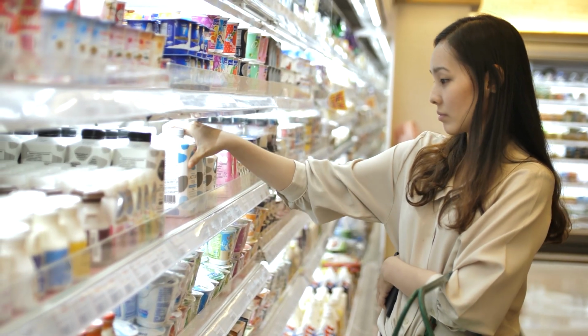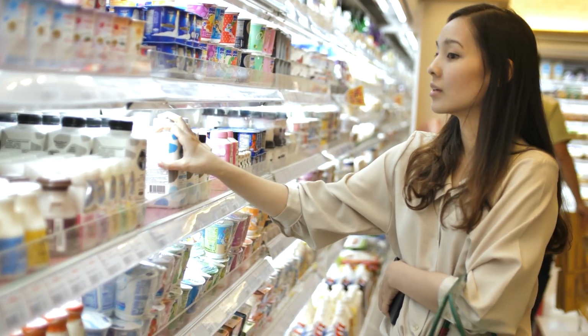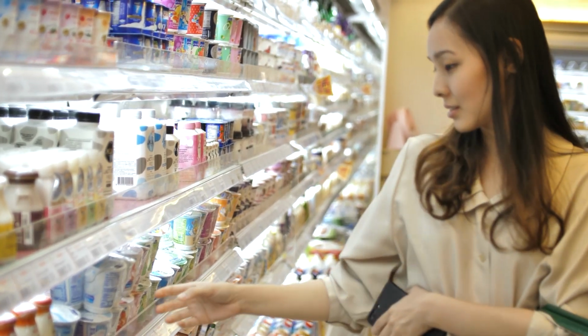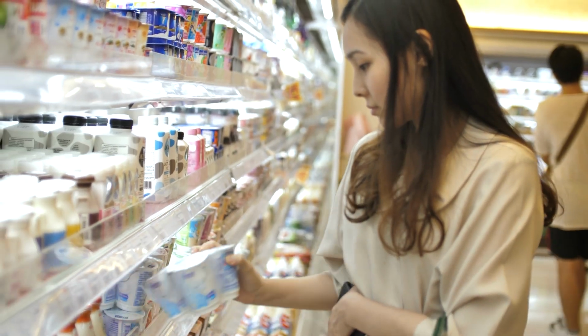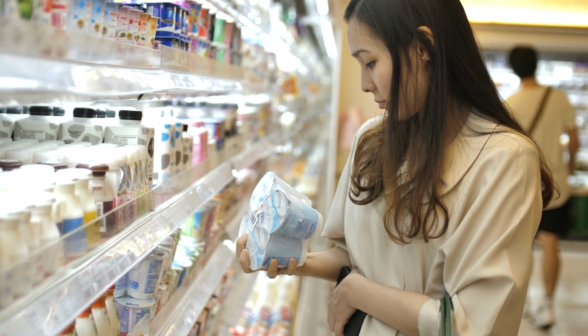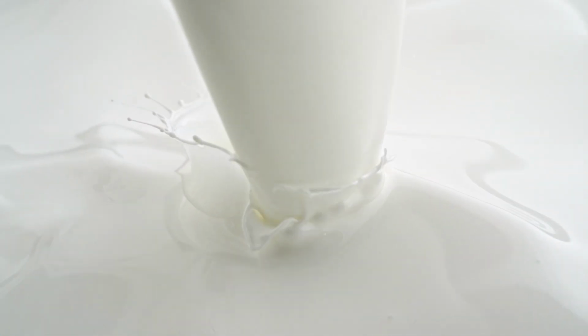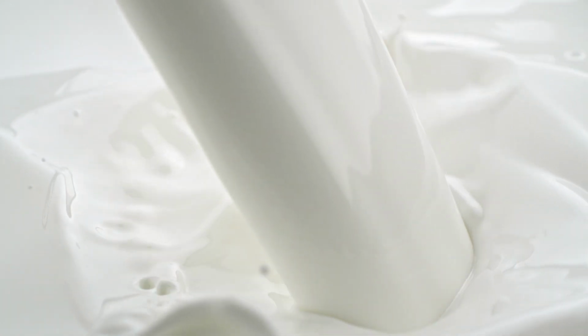And when did you run your first trial? When did you get your first fluid milk delivery to start testing your processes here? We put out some feelers early on saying, hey, in this time frame, if there's any milk available. So for the first commissioning, just running stuff through the system, we actually got some free-ish milk. We got some distressed milk that wasn't going to get packaged anywhere. We said, we need to bring some milk and run it through all this equipment. It's going to pick up shavings or dust or whatever the heck's in the pipes, and then we're just going to dump it anyway. We're going to have it land applied. So we got a couple loads.